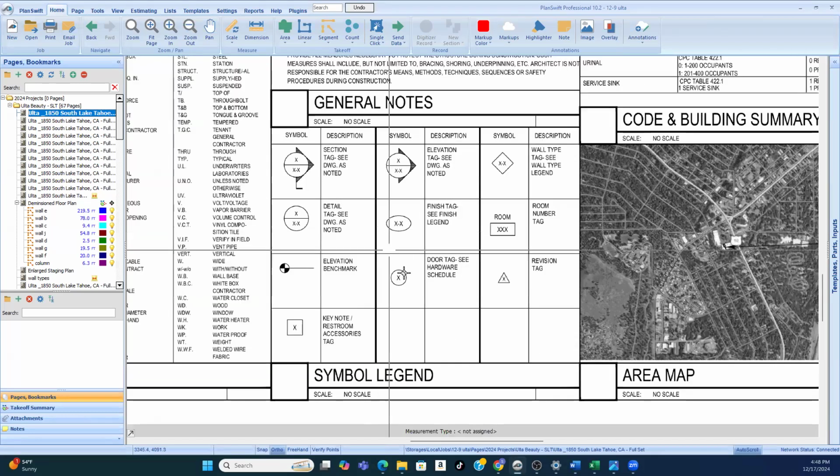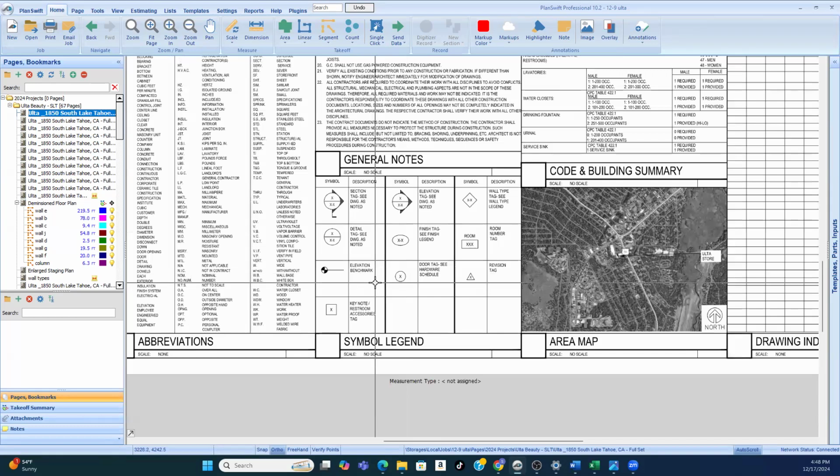So make sure you know that I've got to look at the exterior elevation, and hopefully each window will have a tag on it, which it's supposed to, and I can use a counting tool to count how many windows of each different kind.